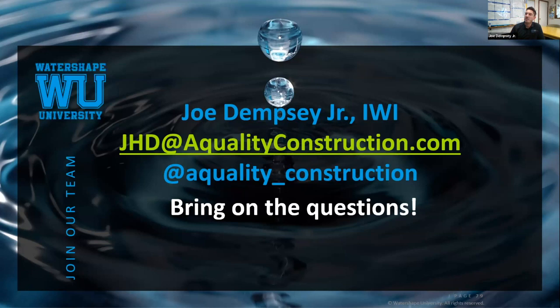I was trying to keep up with change orders, but he was so rapid fire with everything. At the end of the project, I spent probably 2 days reviewing the full scope of work, every picture, redlining, highlighting, very detailed, to make sure that if we didn't install something, for instance, we had some secondary sanitation systems, we ended up not having room for those in the mechanical room. So I took those out. So you got a credit back.